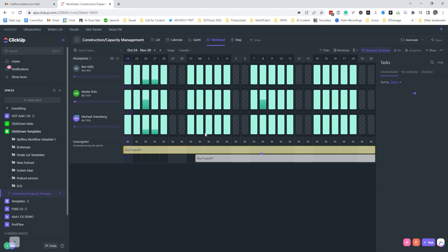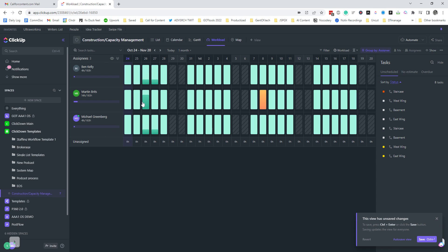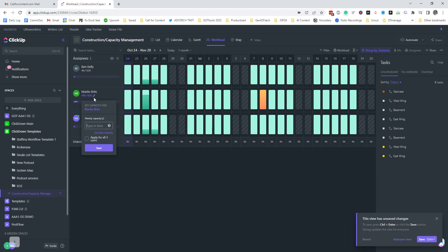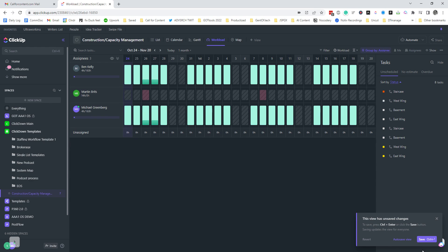So then if we look back over here, we'll see full on that day for that eight-hour task. And only at six hours, still a little capacity left. You can actually edit their weekly or daily capacity and edit it by day as well. So if you've got somebody who's working a part-time schedule, you'll be able to set it up for that.